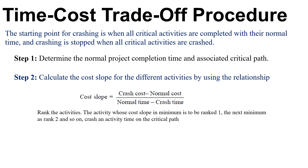After calculation of the cost slope, we have to rank the activities. The activity with the minimum cost slope is ranked 1, the next minimum as rank 2, and so on. Then crash the activity time on the critical path.